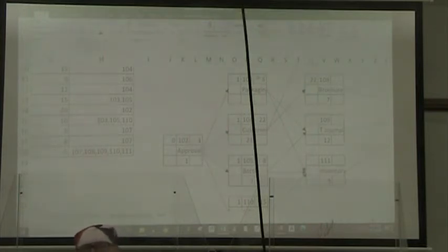But what if one of them changes? So in that case, we're going to say equal max, right? So it'll choose the maximum number between finishing design of the packaging and finishing the design of the bottle.